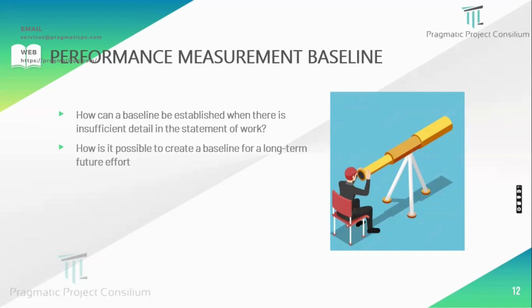Sometimes material is brought so early in the project and kept idle in the warehouse, or in open space, where natural calamities may corrode it. So what is the purpose of bringing such equipment or material so early, when it is not at all required at the site at that moment? Progress has shifted, some activities got delayed. So we have to plan the right way of executing things. That is the very important point we have to see.